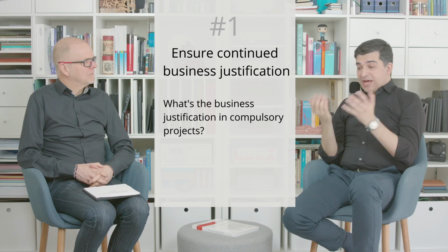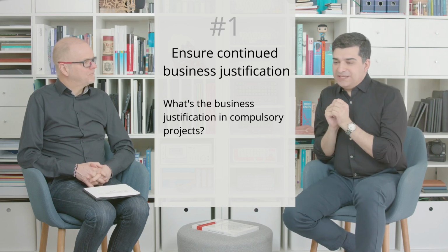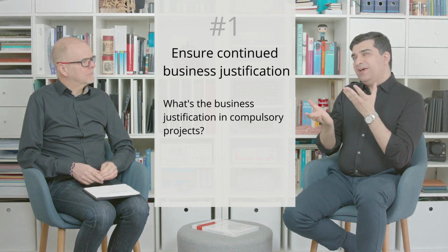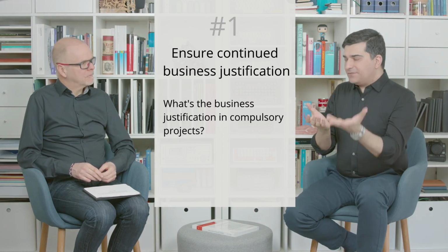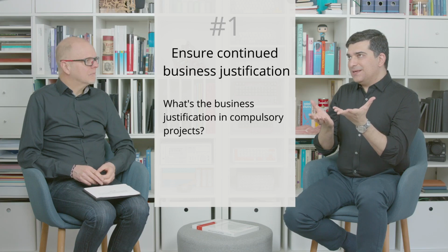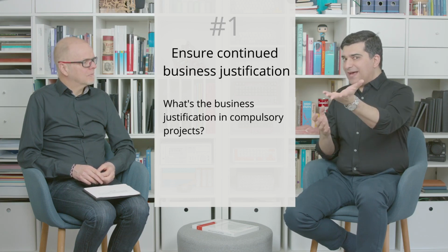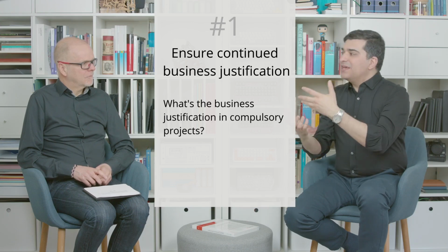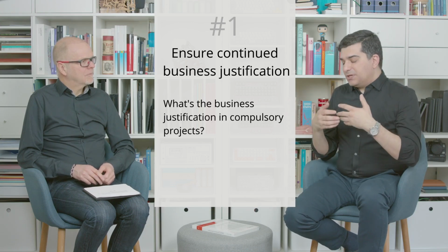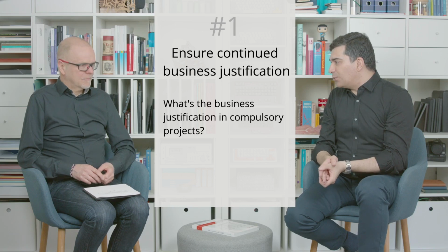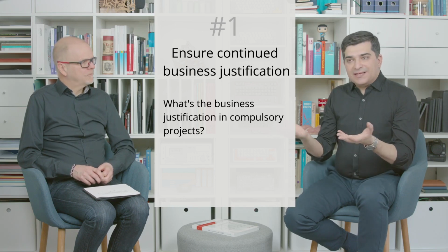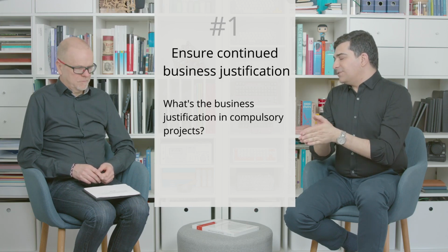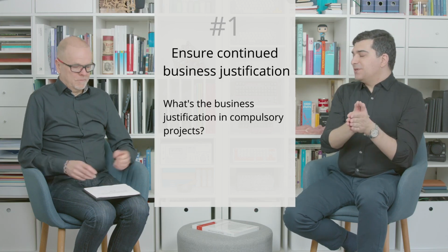That's really easy. We have to ask ourselves. I know that some people have difficulty understanding the business case there, but it's not comparing the world where we have done the project with now. It's comparing that world with the same world in the same time when we have not done the project. If we don't do the project, maybe we are not allowed to continue that service anymore, or something like that. How much money do we lose if we stop providing that service? That's the justification for this project.